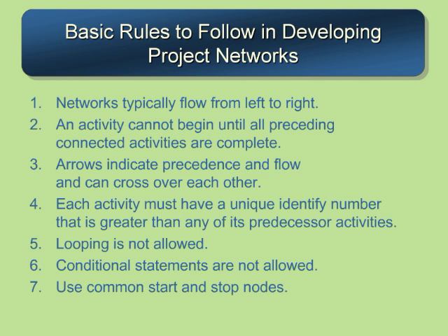And usually looping occurs because you created some conditional statements, and so to avoid that, conditional statements are not allowed. There is no uncertainty allowed within the project network. That's why sometimes this form of project planning doesn't lend itself to highly uncertain projects, where you have lots of conditionals or things that you need to resolve before the project can be successful.